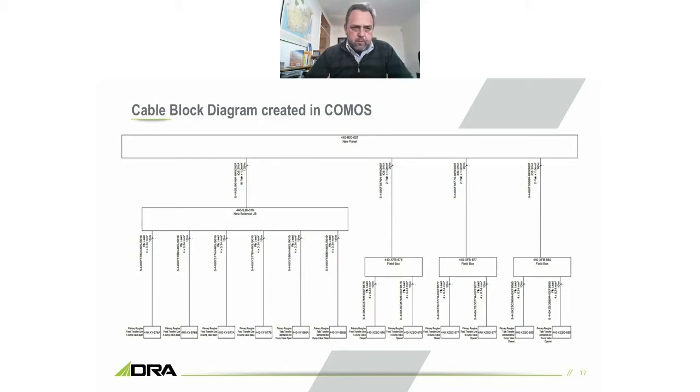This is a very powerful aspect of COMOS. I'm afraid the text will be a bit small for you to see in your format, but cable block diagrams, I can give this to a contractor and say, right, these are all the cables that you're pulling, give him more of a holistic view. He'd obviously work with us together with the cable schedule as he's pulling, but use this to plan his construction job for the day.